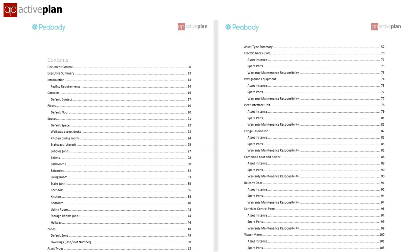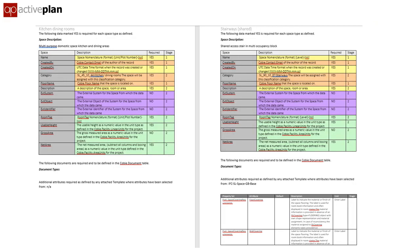The architects can work to a schedule of space types, and all other asset types have their own two or three page set of specific requirements, so everyone knows exactly what's expected without having to refer to other documents. Here we have two room types: the kitchen diner just needs a unique room number, net area, and finished ceiling height, whereas the stairwell needs information on floor coverings and finishes.